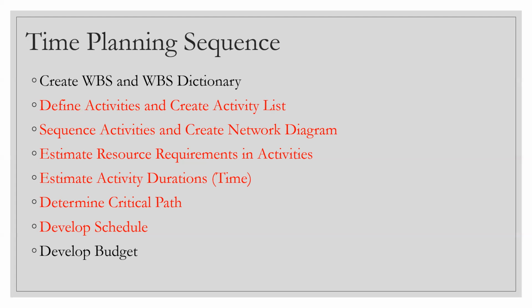Maybe in the future you're going to hang some pictures on the wall, and for the pictures you probably have to do some designing, or you have to pick up some old pics from your album and find them or collect them or keep them in a place, right? Now that all can be done in parallel while the wall is getting constructed by the men. One of the guys in the team can actually start choosing the pictures that they are going to hang on the wall, right? So that activity can be done in parallel.